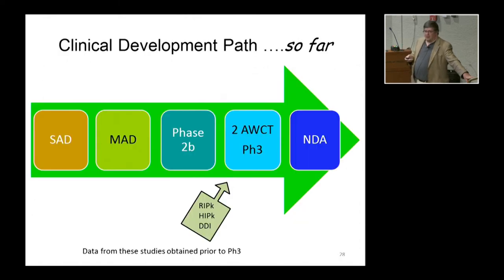All right, so now we have our map again. All right, and this is the beginning, and this actually isn't quite the end. We'll get to the end soon. Does anyone know the phrase for what the shortest series of studies to go from beginning to end is called? It's an expression people like to throw around these days. It's called the critical path. So the critical path, those are the studies that define your timeline, all right? Because these studies here, you can do almost any time, right? You can shove them forward or back, but you start with SAD and you go to NDA.